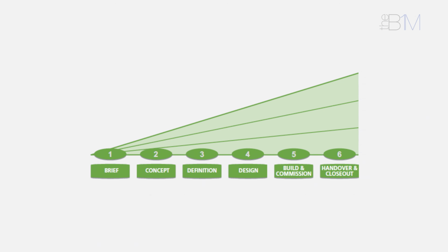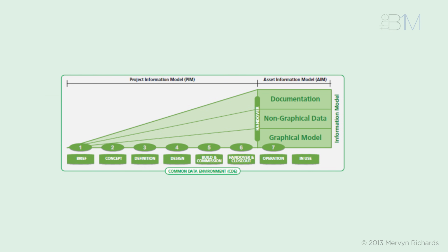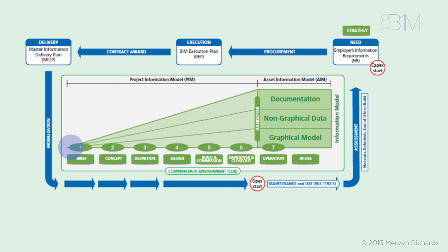Currently, cost managers might produce an indicative cost plan at the outset of a project, and then update it once or twice as a project develops. They only cost completed designs at the end of a long iterative chain when their project team have finished designing. In a BIM process, cost managers are engaged right from the outset and are an equal player in the project team. Their time is freed up from painstaking manual takeoffs in the later stages and used in faster, more accurate cost reporting up front at a much more influential stage. They effectively maintain a living cost plan and become invaluable in helping their teams design to budget.